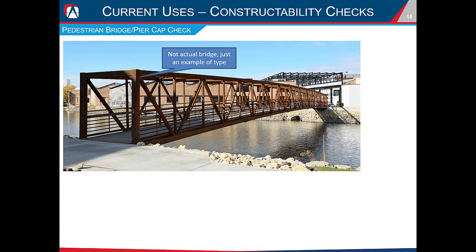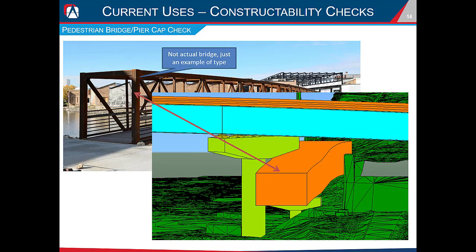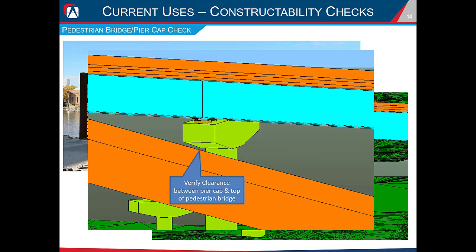Another frequent current use of OBM is for constructability checks. In one example, a pedestrian bridge was going underneath a proposed bridge. Although OBM doesn't handle truss bridges, the envelope of the pedestrian bridge was modeled as a deck component in OBM to check clearances. The original clearance check had only considered the superstructure depth to the top of the pedestrian bridge, and we were able to confirm we had the necessary clearance with the underside of the pier cap as well.